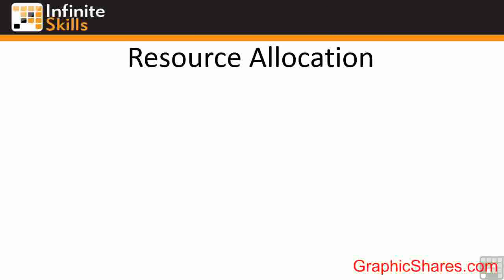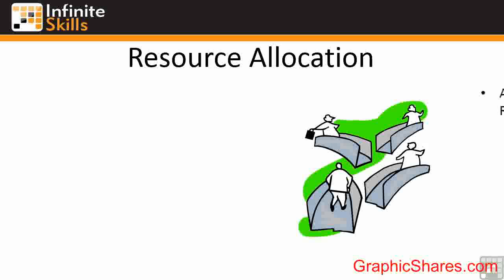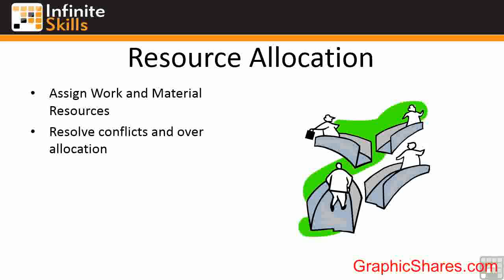Once you have your resources entered into the system, you need to allocate them to your tasks, and that's where Microsoft Project will do a lot of the calculations for you. When you assign work and material resources, conflicts may arise. There are no conflicts with material resources, as they are assumed to be infinite. But work resources could conflict if you're trying to use the same person at the same time. Those conflicts and any over-allocations would need to be resolved — Microsoft Project can help with that. Once all conflicts are resolved, you can produce the final costings for the project.